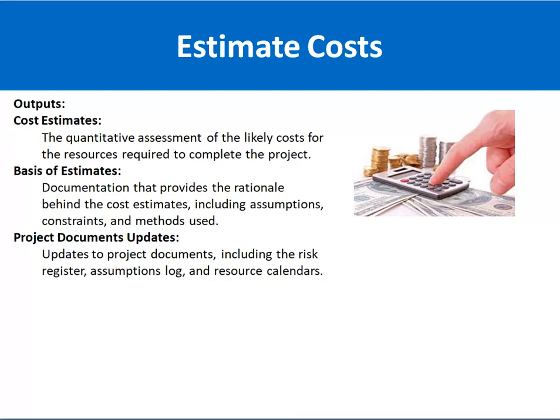The output of this process is the cost estimate. The cost estimate is the quantitative assessment of the cost for the resources required to complete the project. Like, this is the cost required for the completion. Then you must have the basis of estimates, the documentation or the rationale behind the cost estimation. After that you have to update the project documents as well, including the risk register, assumption log, resource calendar, etc.